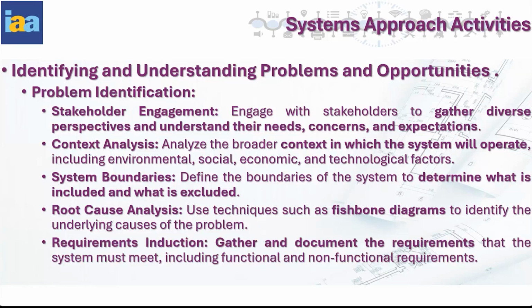Then you have to gather the requirements. The requirements definition is a very important part of the document. Once you make a requirement, you should also visualize how you are going to verify it. That is the basic system engineering philosophy. Suppose you are writing that my battery should give 12 volt, then you should also know how you are going to verify that. And if you are saying my battery should give 12 volt under this much load, then also you should know how you are going to verify this during the test. Once you have done these things, one of the major steps, the problem identification, is done.